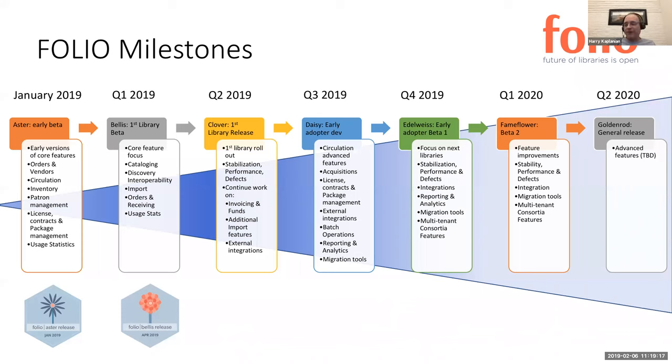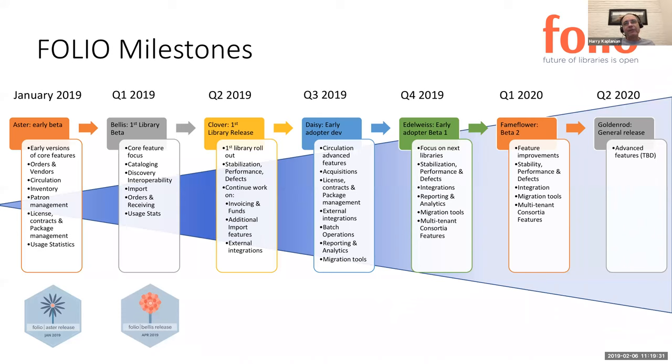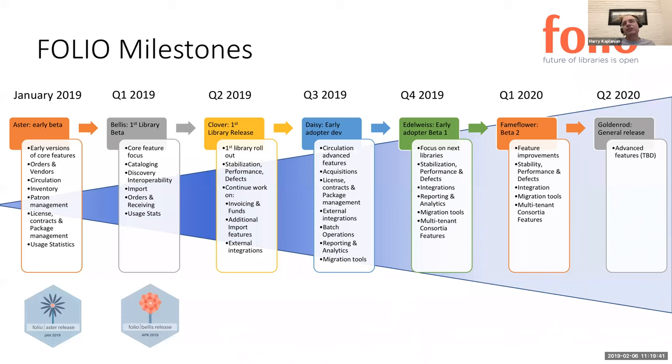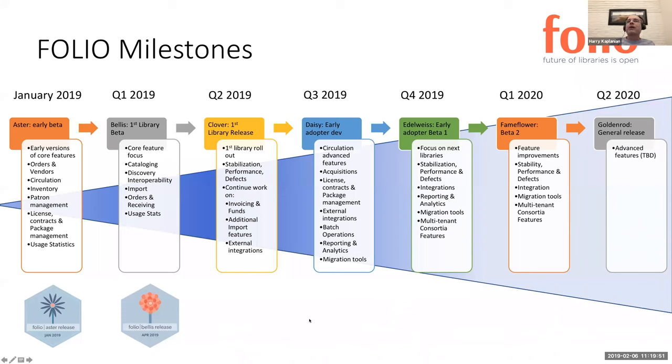In every software project, the things that you've done, you absolutely know about. The things that you're working on, you know the most about. And as you get further and further out in your timeline in terms of features and functionality and what you expect to build, the uncertainty factor starts to increase and it increases in many cases quite rapidly. And so all that cone of uncertainty is trying to represent is the things we know best about are the things we're currently working on. But as you get further and further out into 2020, it becomes harder and harder to predict and therefore a little less reliable. So looking at these releases in January, the beginning of this year, we rolled out the Aster release.